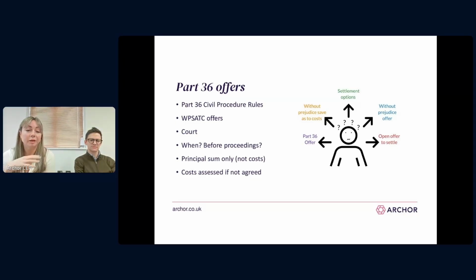Now, if a party does accept a Part 36 offer, the legal costs incurred up to that date need to be agreed separately. So if the costs can't be agreed, there's a separate court process to deal with the legal costs and how much must be paid by the offering party.